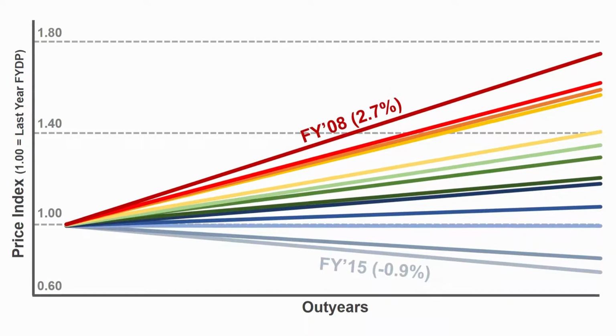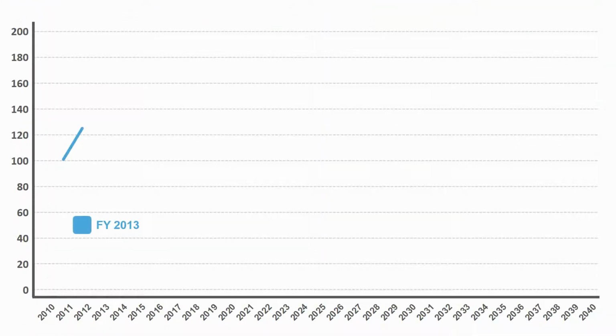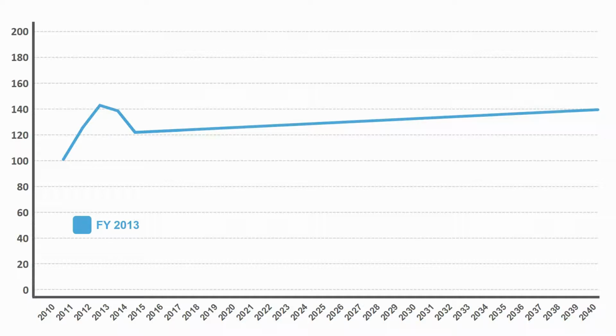Suppose in fiscal year 2013, the last observed barrel of fuel was $103, and forecast guidance for the next year was $128, representing a 24% increase. Then fuel escalation guidance increases yet again before decreasing slightly, decreasing at a steeper rate, and then increasing once more. The 5th and final year of guidance showed growth at only 0.6% per annum. If we extend that 0.6% escalation rate out indefinitely, then by year 2040, we will forecast the price of a barrel of fuel to cost about $140.